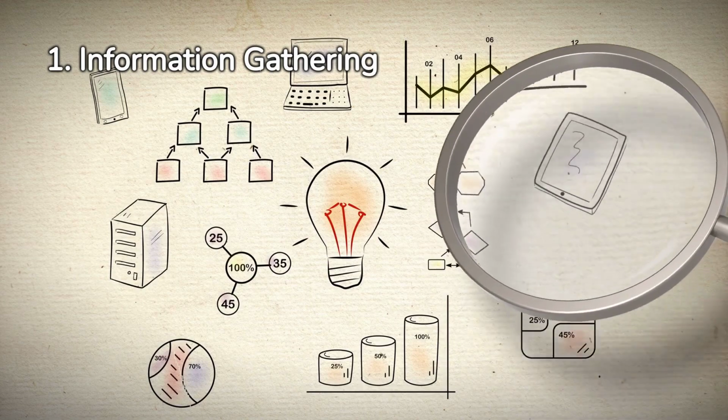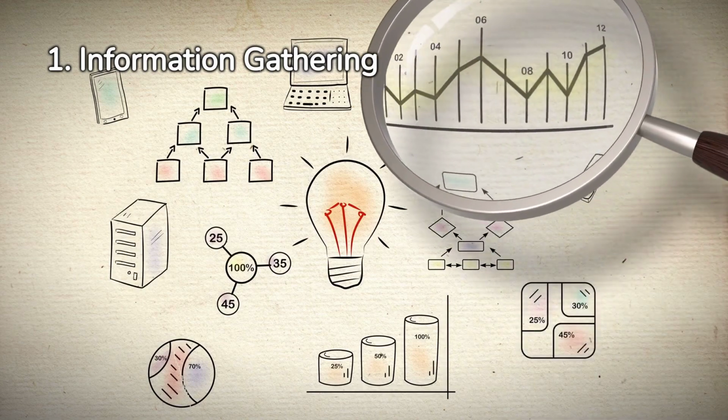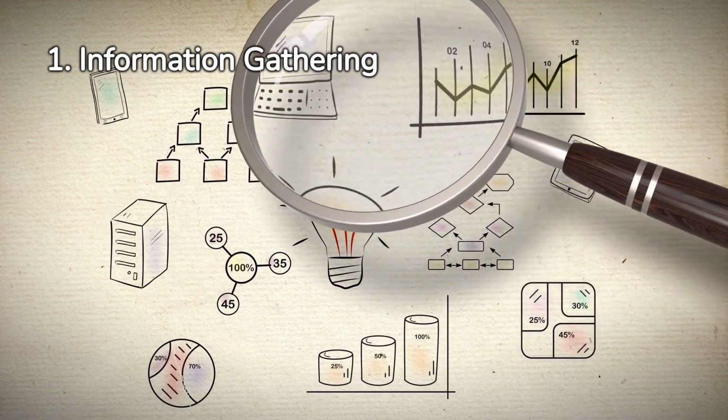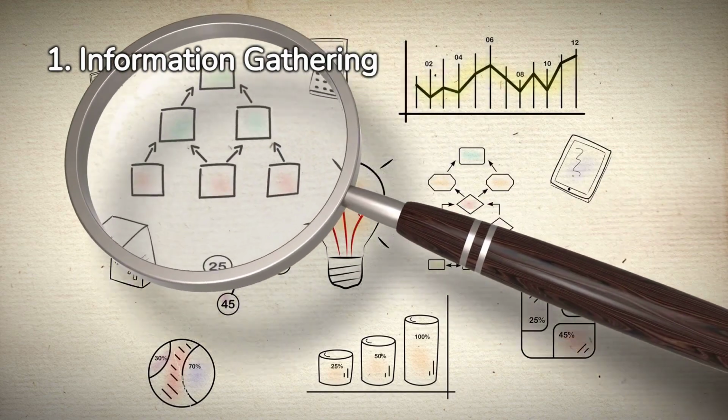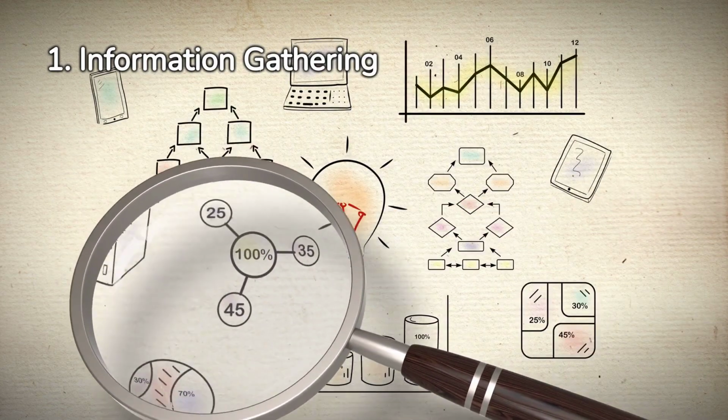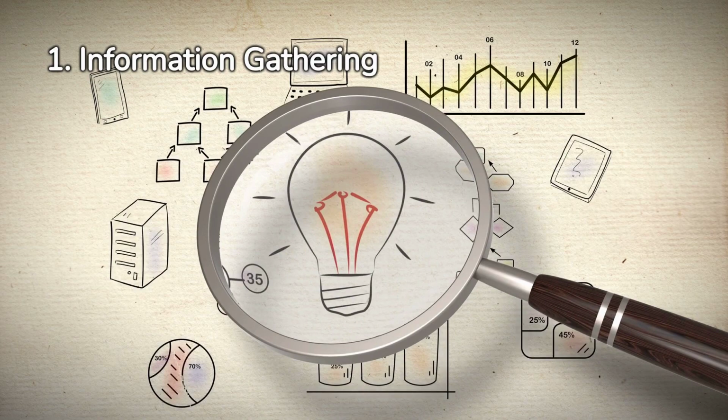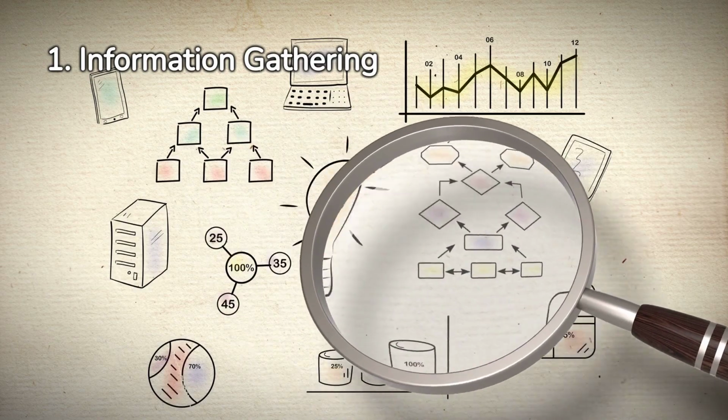1. Information gathering. This step entails discovering the relevant stakeholders in your project, reviewing the construction risk reports of similar projects completed in the same region, researching economic, legal, environmental, and other aspects of the project.